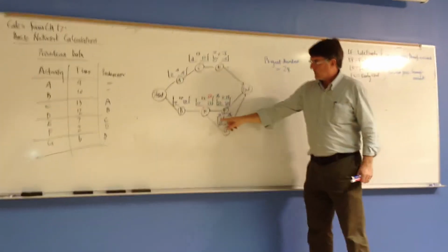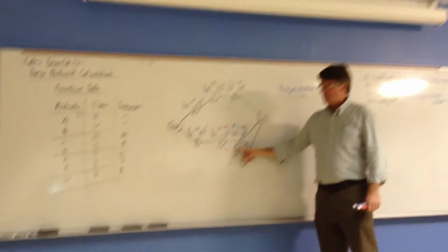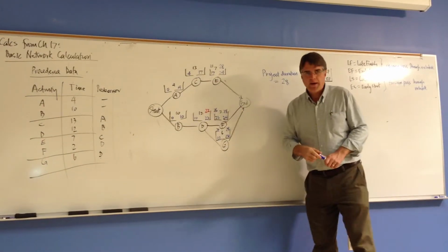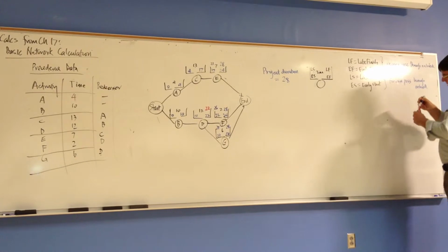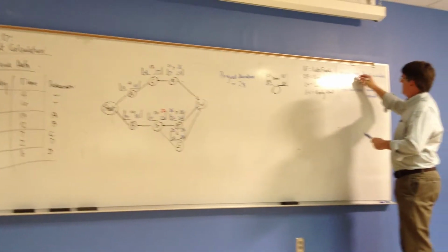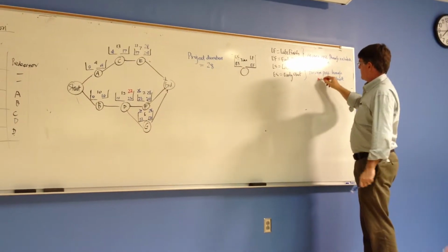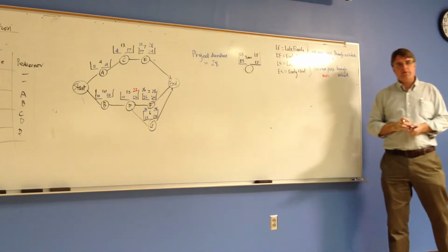This one wants to start at 22. Oh, that's when you can start. Yeah, the late start of this one is 22, so you see, I must have gotten done with this one by then. So on the way back, it's going to be the minimum, if there is a run-in. On the way forward, we didn't have this, but you're going to have a max.